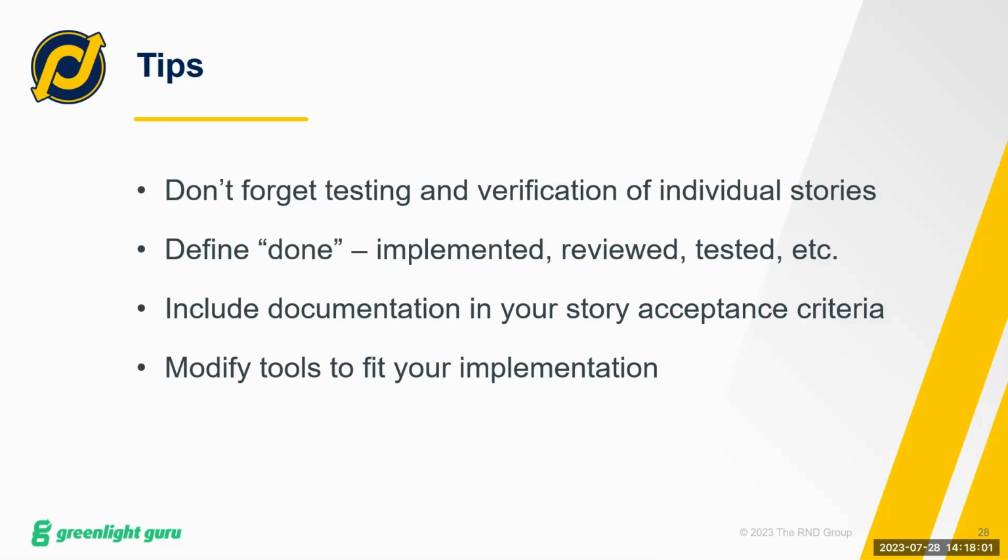You don't have to use tools right out of the box. A lot of them for Scrum and Kanban may have a to-do, an in progress, and a done. That's what I've seen most commonly. Very, very simple, right? But I think for med devices, it has to go a little bit further. At the R&D Group, we have a to-do, an in progress, and then a reviewed state, or a column, swim lane. That means it's been reviewed by the developers. It's gone through its code review, peer review, whatever. And then it's not done until the individual item has been verified. So, like I said, just feel free to modify your tools to fit your implementation.